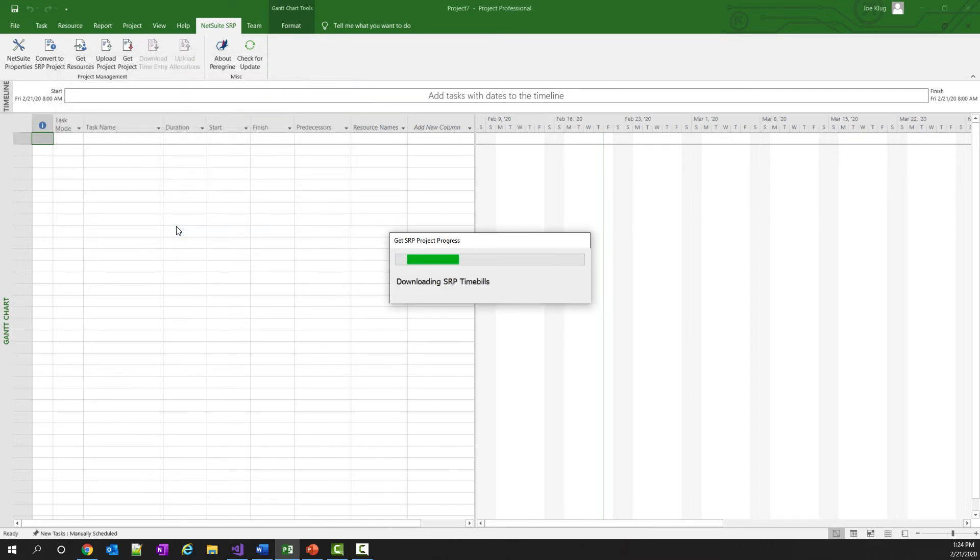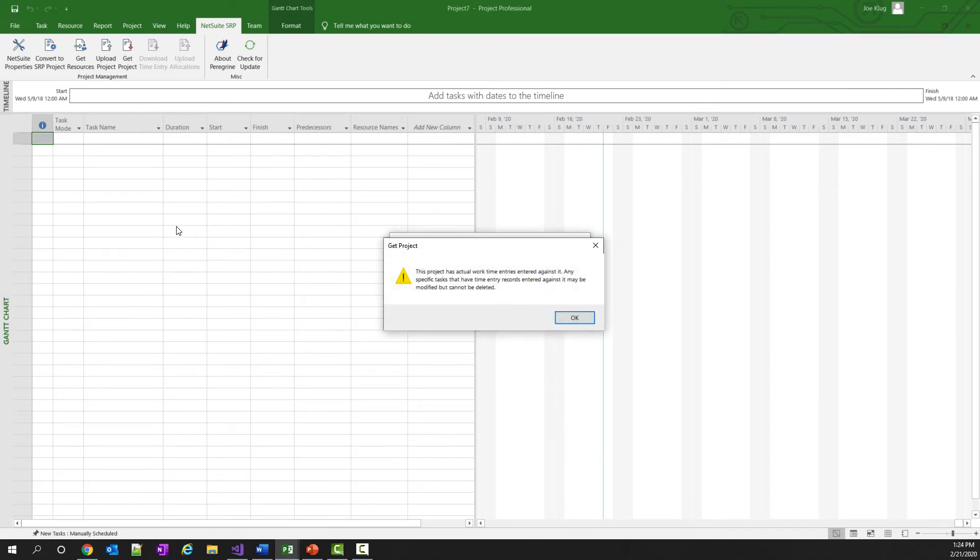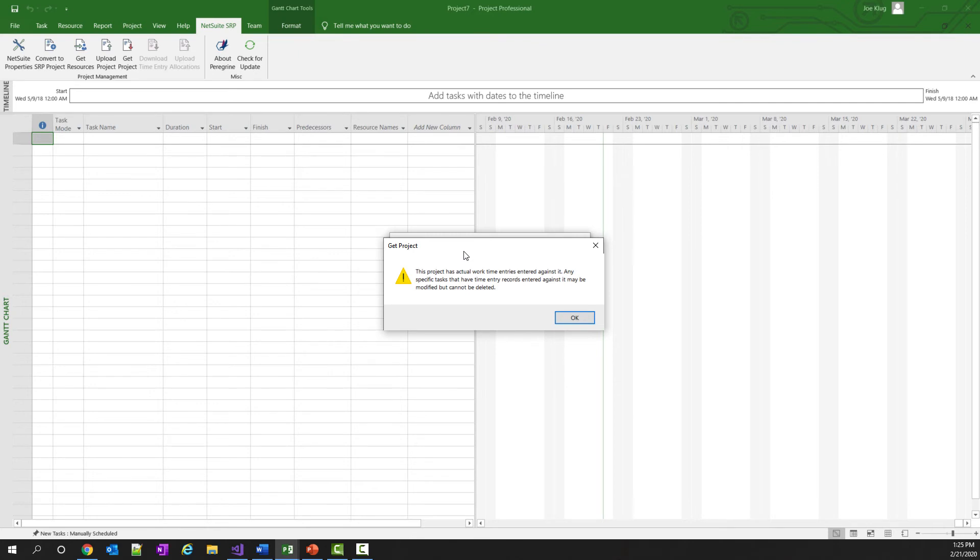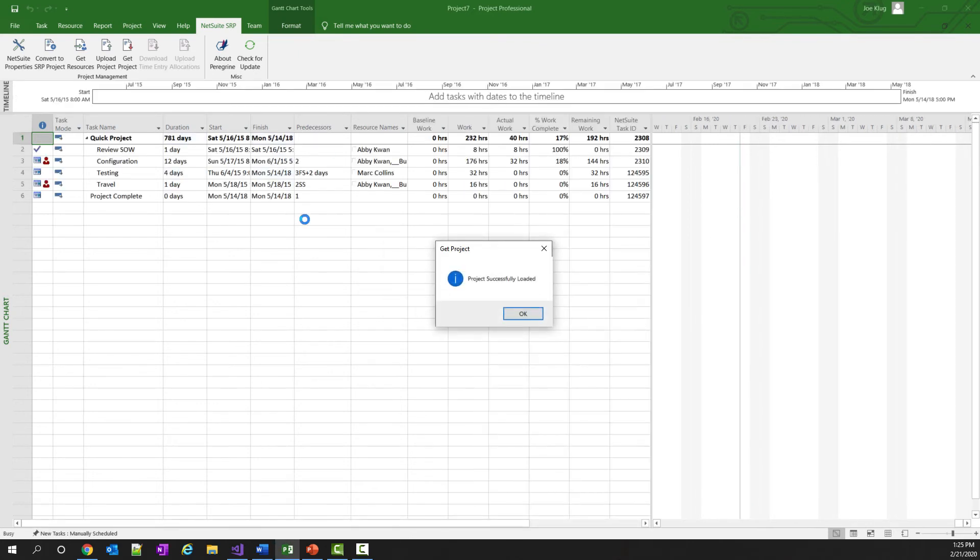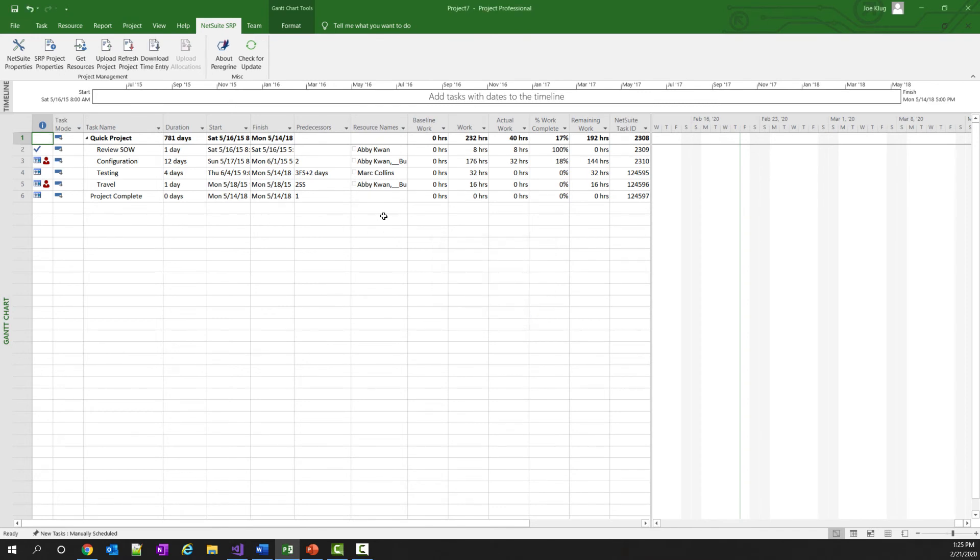The add-in will download all the information that's necessary to display the project in Microsoft Project. I was just given a warning that states this project has tasks with actual work time entries entered against it. NetSuite does not allow you to delete a task that has actual time entries entered against it. So the add-in will keep you from doing that in Microsoft Project as well. After I click the OK button, it will finish downloading. And here are my short list of tasks with the resources.